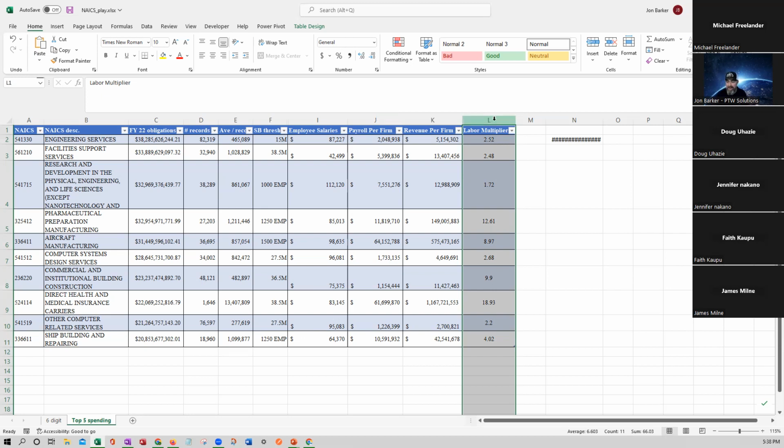I found out about this 7 years ago, when I was consulting for CPSR firms, that's exactly what we used. We use these industry standards as a wrap rate. For an engineering one, 2.5 is fair and reasonable. How do I know? Well, it's coming from the IRS. It's coming from the census. And in my conversations with government auditors and contracting officers in particular, they love it when you use government data to validate the prices that you're charging. Again, I'm cherry picking the data.